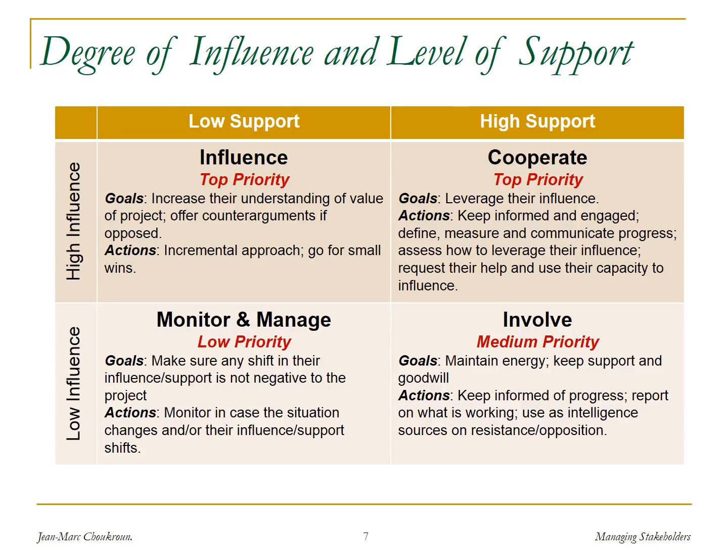Your means of action is to try to influence them to minimize the negative impact they can have on the project. So your goal is to somehow increase their understanding of the value of the project, offer counter arguments if they are opposed. Remember what we had a couple of weeks ago on influence: you're not trying to convert them to supporting the project.